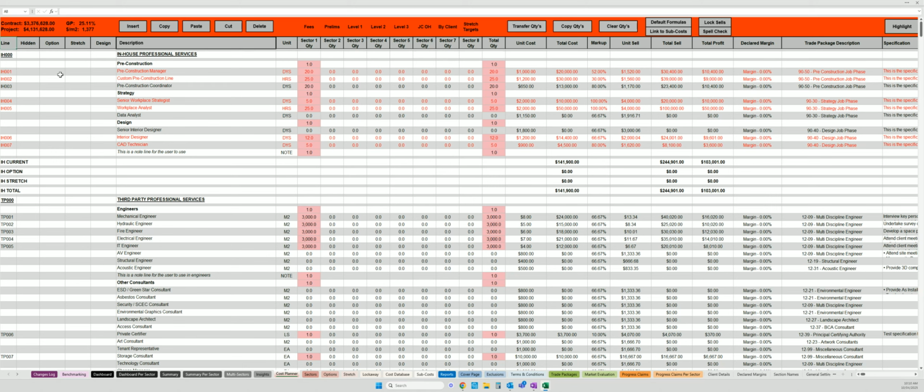It shows your profit percentage above the line. And it also shows you your rate per unit, in this case, dollars per square meter on the project level, because this is from a client centricity point of view. A lot of the time you're designing and you're writing your cost plan to meet a client's dollars per square meter or rate per unit. And so that metric is also here. So you have instant access.